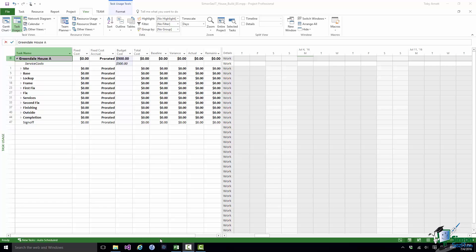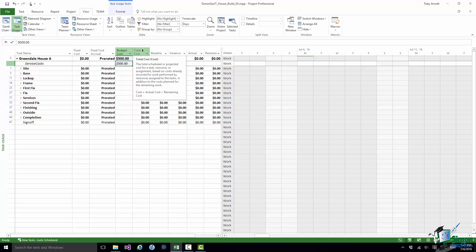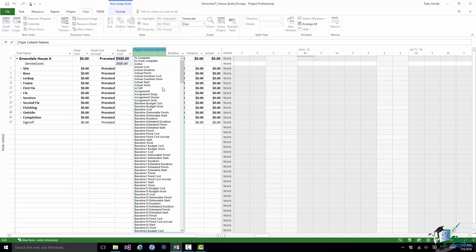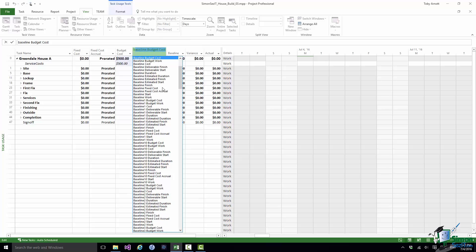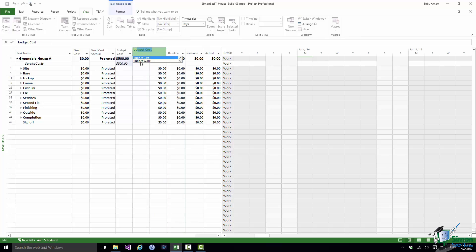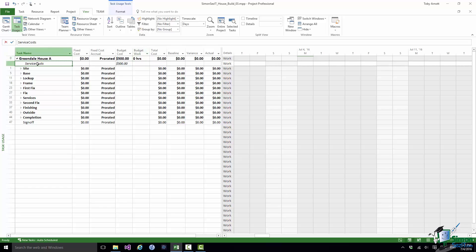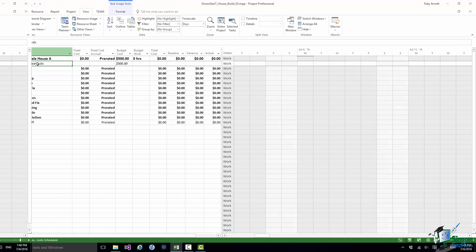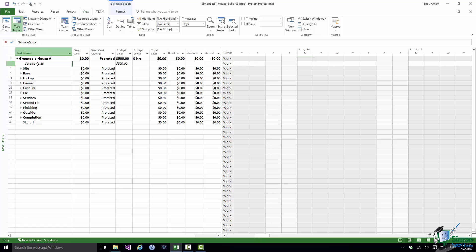In order to specify that budget cost you are really quite restricted in how and where you do it. In this case I selected the cost table, inserted the column budget cost, and then against a specific resource item I can specify the budget cost. If I were dealing with the same situation with budget work, the approach is very similar. I would show the budget work column and specify it against the particular budget work resource that I had already assigned to the project summary task. So there's my budget for service cost.